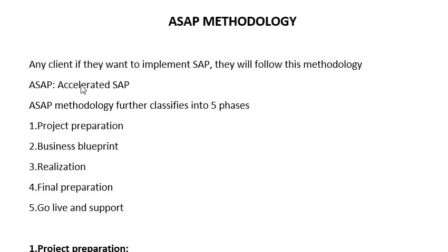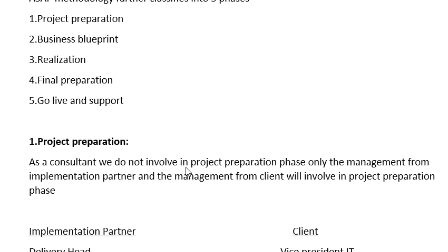So any client, if they want to implement SAP, will follow this methodology. SAP methodology means the aim is accelerated SAP. So SAP methodology further classifies into 5 phases: project preparation, business blueprint, realization, final preparation, and go live and support.